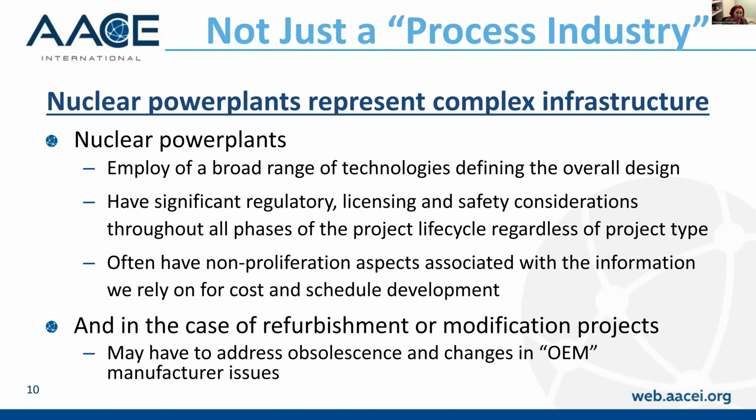Each of these different designs has its own flavor of nuclear safety considerations, which means we have redundancies of system, structure, and component elements, which you wouldn't normally encounter in other types of process industries. They also typically have a very significant regulatory and licensing requirement, and that can happen throughout the project lifecycle. This really translates into labor and paperwork deliverables that are well in excess of what you would normally see for standard environmental assessments or operating licenses for other types of process industries.